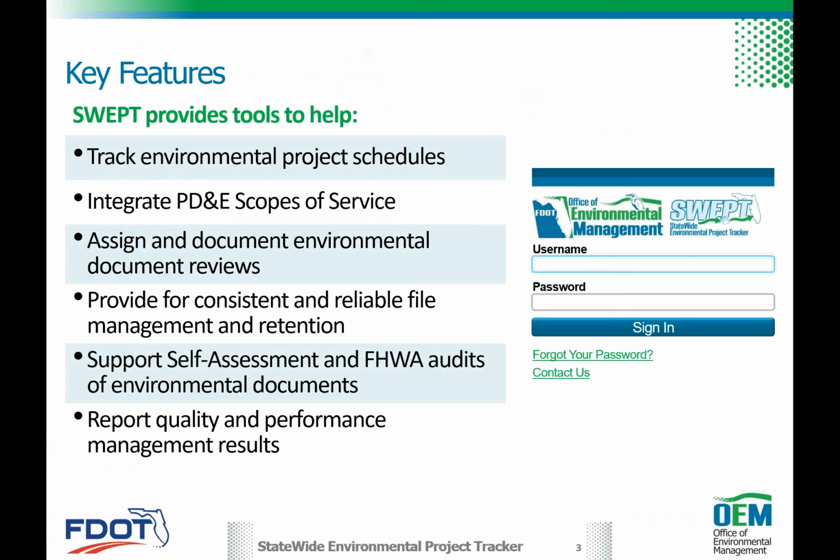Part of it is also designed to pull in the environmental project schedules. The districts work through their Primavera schedulers to develop a project schedule. That project schedule in Primavera is uploaded into the project schedule and management system, PSM. They will use the 700 series of environmental codes, and based on that, the Primavera schedule gets uploaded into PSM, and